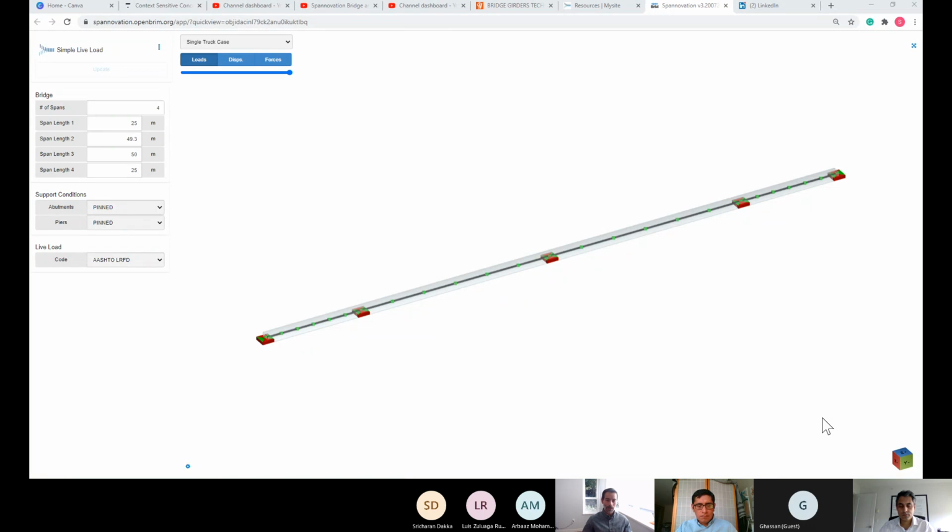You'll also notice the way we approach the second example is different because we're working directly with the contractor. What happens in a design-build project is that you get a baseline design as part of the bid documents, right? There is a baseline design that the owner's engineer has created for you, and that's a 3-span structure. So we brainstorm at our end and come up with a few different configurations. There is the 3-span, but we also come up with a 2-span configuration, and then we evaluate them just the way we did on the Shanders, except we don't do a multi-account evaluation. It's mostly based on price, as long as these alternatives meet the project criteria.